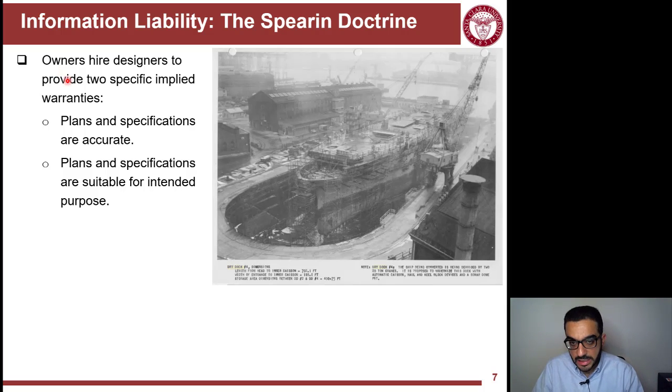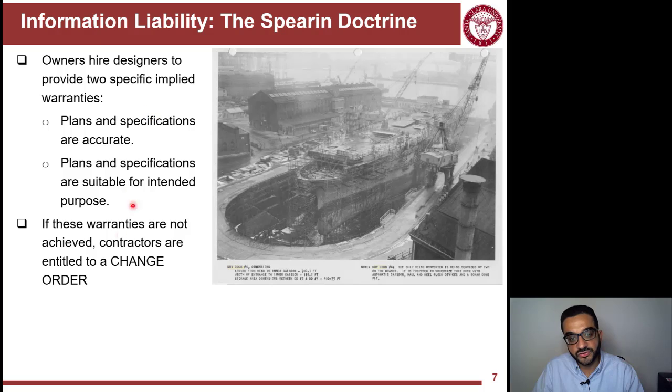for this project. Now, if these warranties are not satisfied, then the contractors are entitled to change orders. So you give me plans that don't work, this is a change order. This is the cost for the information. So this is the information liability.